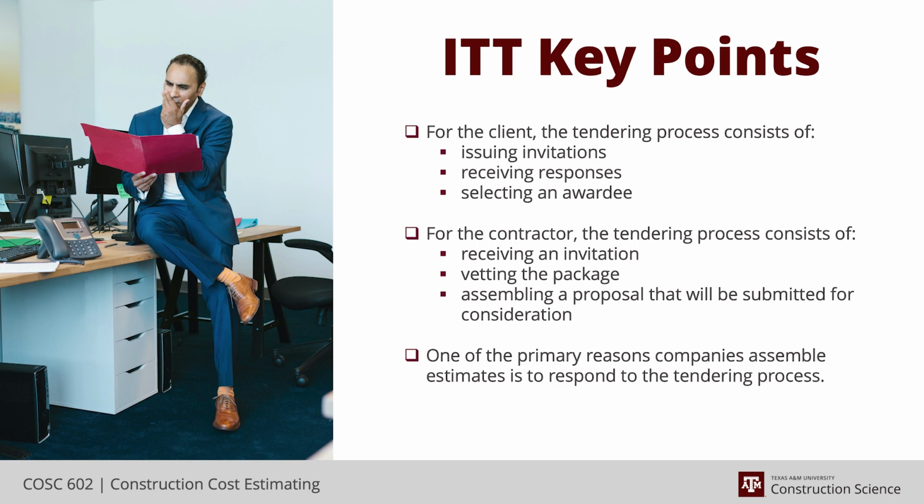Maybe it was a cost reimbursable job. And so we were required to assemble an estimate to present to them what we thought the project was going to cost, but we weren't in a competitive situation where we were going to lose it if we were too high or too low. We put forth our best effort to tell them what we think, and it's pretty much open book, and then everybody gets a chance to beat on it. The client, our own management, and we all work through what we think the best number is at the end of the day. And everybody has their own reasons for why they want to push it up or push it down, squeeze it or loosen it up.